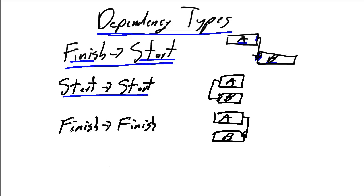Our next dependency is very similar: Finish-to-Finish. Task B cannot finish until Task A finishes. So again, Task B is my weekly status reports—they cannot finish until the very last task on my project has finished. Between these three, I would say 100 percent of all your dependencies on your project will be one of Finish-to-Start, Start-to-Start, or Finish-to-Finish.